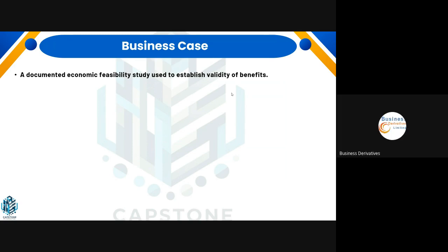In the business cases I've worked with, it begins with an understanding of what the current situation is, and equally identifying the problem that we're trying to resolve, and putting into context the approach that we're taking and the options that are made available, beginning from the default option of doing nothing, and of course the other options that are also being considered.